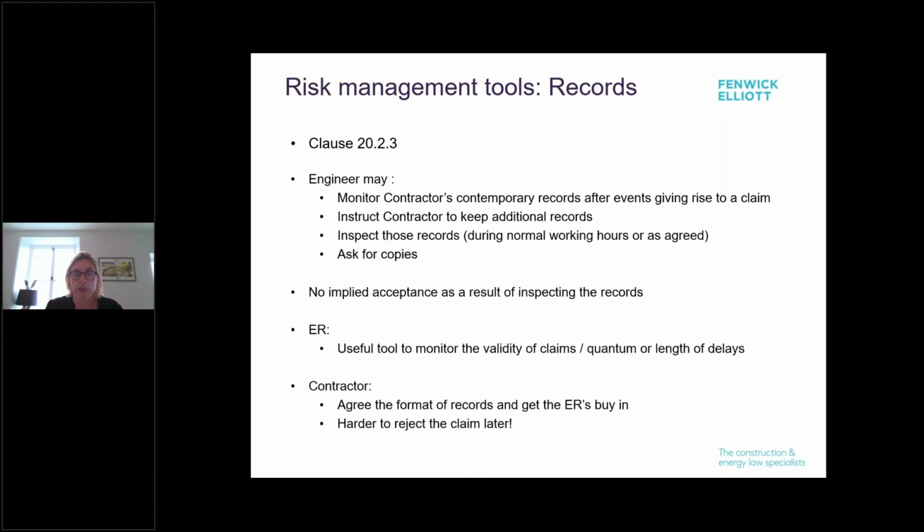They may want to do that potentially in relation to COVID claims that are going on in various jurisdictions at the moment. And also with the contractor, perhaps you want to try and agree the format of records to get the employer's buy-in with the disruption or lack of productivity that's associated with COVID. It can be hard to get all your records in a row and produce the claim in the level of detail you want. And obviously, if you've got people agreeing things as much as possible, what you want to see to validate those claims, they're harder to reject at a later date.